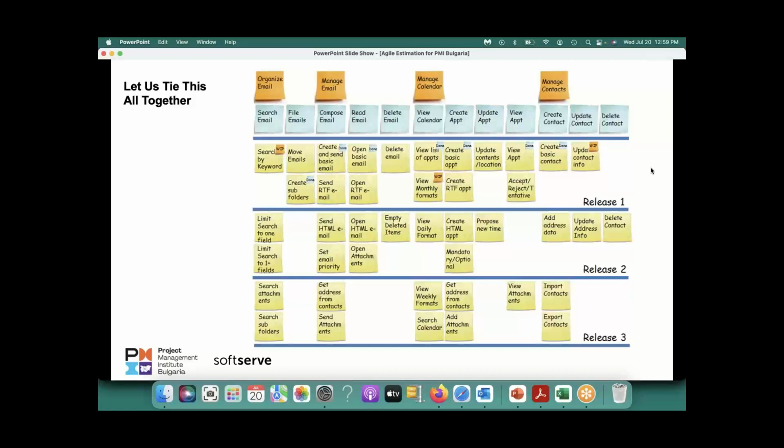So now deadlines mean your time is fixed, correct? What you need to do is quickly do product planning, affinity estimation, right? Quickly do that. That can happen. I have done product planning for very large projects. It will not take more than 2 days to finish that. So start from there. Based on that, you will get a very high level idea of what can be done within that deadline, right?